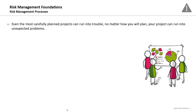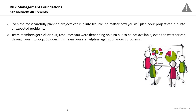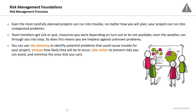Even the most carefully planned projects can run into trouble. Team members get sick or quit, resources you were depending on turn out to be unavailable, and even the weather can throw you into a loop. So does this mean you are helpless against unknown problems? The aim of conducting risk management activities is to reduce the probability and impact of both known and unknown problems.